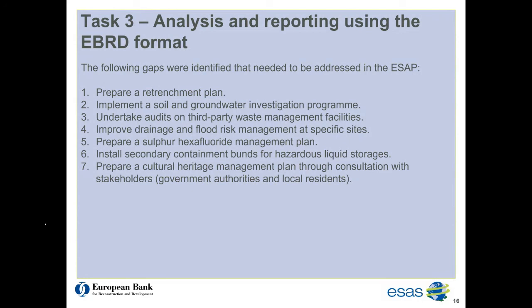Specific sites needed a flood risk assessment undertaken to improve the flood management, and the client also needed to prepare a sulfur hexafluoride management plan. Secondary containment bunds for some hazardous liquid storages across the sites were also required. And in relation to the murals, a cultural heritage management plan should also be prepared through consultation with key stakeholders.